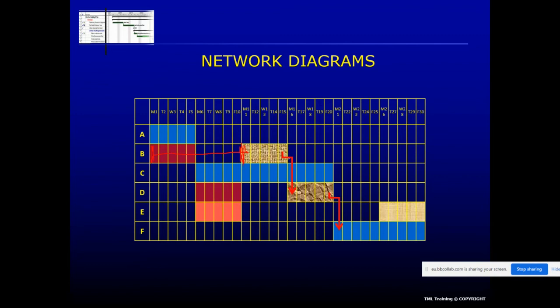If we took longer than that for B, if we delayed it further, what's dependent on B? D is. Then D would get shifted out 2 days, and F would then get shifted out 2 days, and it would only end on day 32, which would be a problem. So you can't take 12 days to get this finished. You've got 10 days of float time, no more.